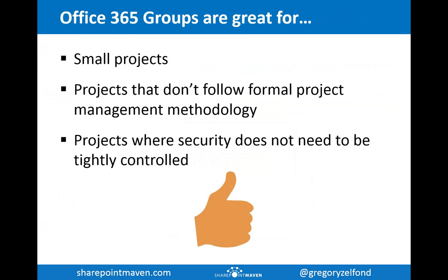Well, in my opinion, Office 365 groups are great for small projects. If you're doing a 2-year project, it's very likely you will have lots and lots of data. It's very likely you will need to manage your schedule with Microsoft Project. So for the moment, I recommend that you test out Office 365 groups for smaller projects when you really don't need any formal project management methodology. You really don't need much oversight.